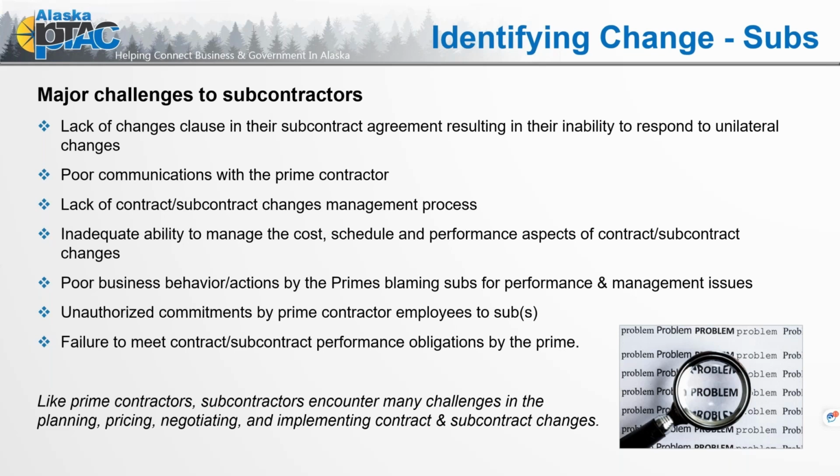And so these major challenges that we talked about really roll up to how is your contract ability to push upward to your prime when these are in place, and these actions are then impacting, if they're initiated by the prime, and they're impacting your cost performance. So this slide is really just my way of saying, for all of you that are involved in subcontractors, negotiate those subcontract agreements. Make sure that there's a changes clause in your subcontract agreement that defines, should these circumstances happen, that you have a legal venue in which to resolve that.